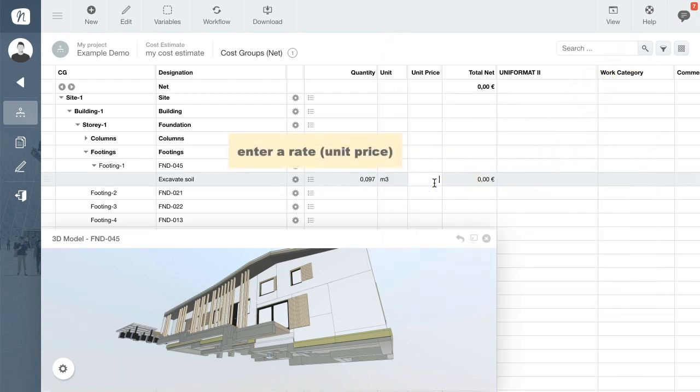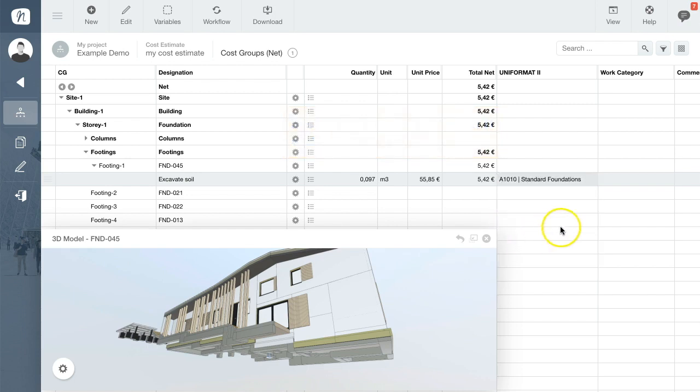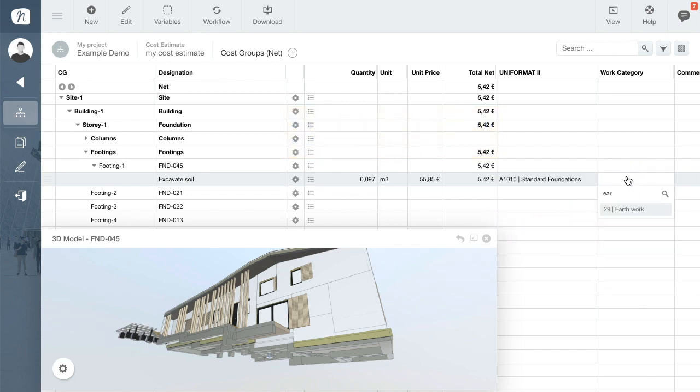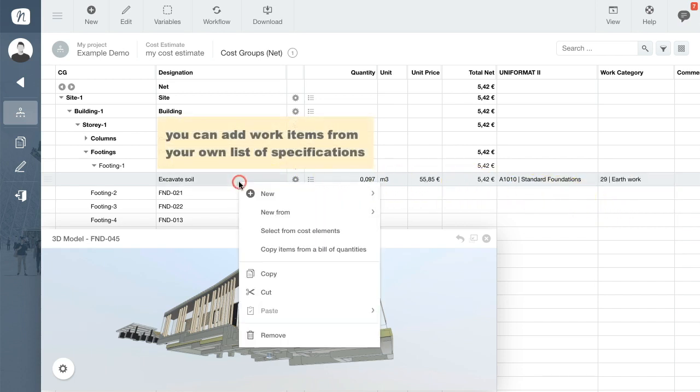You then need to assign a Uniformat 2 code and a work category so that the data can be appropriately recorded and categorized. As well as manually entering new rows, you can also select work items from your own specifications.